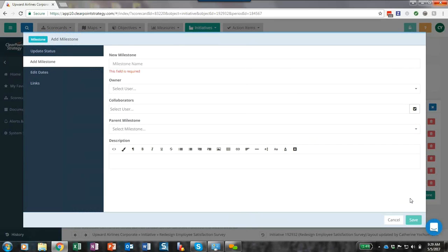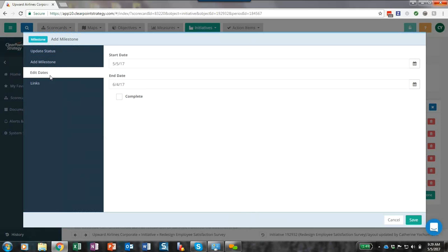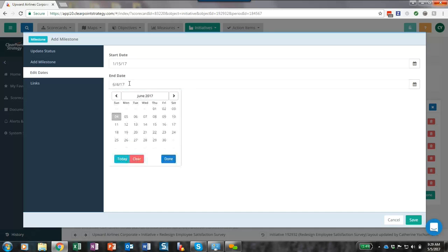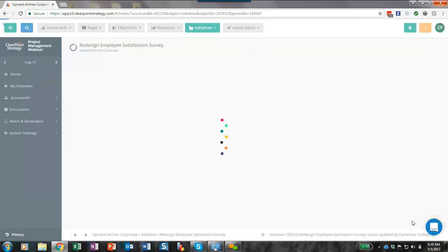So I can click on Add Milestone here to add a phase to my project. And an edit window is going to pop up for me to add the details. So we'll call this Interview Survey Consultant. And we can click here on the Edit Dates tab to give this an independent start and end dates from our project. So maybe this milestone in particular is going to be from mid-January to the end of March. And let's click Save on that for now.